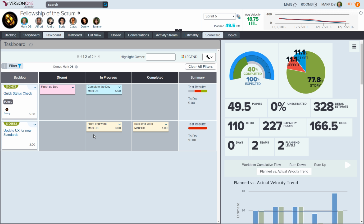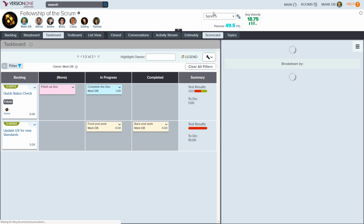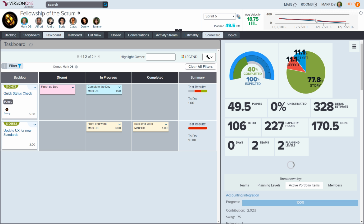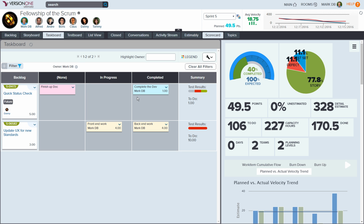And this is just showing me the tasks that I have to complete. So on a daily basis, we'll come in here, we'll say, hi, I'm Mark. I'm working on this task. It's still in progress, but I'm going to track this. I've actually put 4 hours on this already, and I'm going to put 1 more hour. I have one more hour left to go on that. So that's a way I can track my actual effort and my remaining to-do hours. When I save that, that reflects in my burn down. It also shows this is in progress. I can move it over to completed when I'm done, and that's going to show that that specific task is completed.